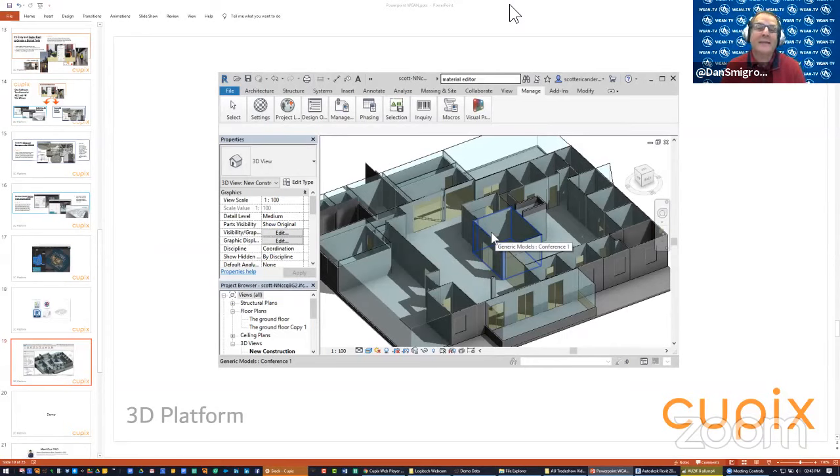And then the second piece is the client says, okay, great, let's proceed. The next piece is, okay, we need to get quotes on the floor covering, on the wall covering, on the amount of paint. And the measurements are going to be good enough for quoting on a project. The third form of measurement is that we're ready to go buy windows. And the answer is, it's not good enough.